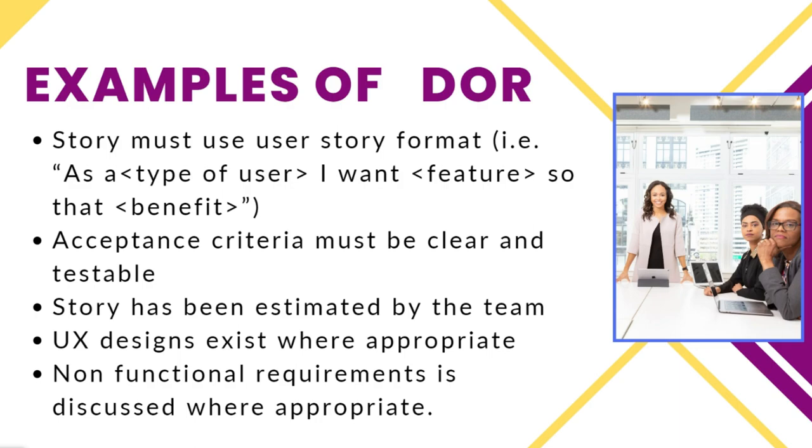All right. Another thing could be non-functional requirement is discussed where appropriate. So part of your DOR could be, in order for the story to be ready, we have to make sure we've discussed the non-functional, such as your performance. You may not have a requirement or AC that says performance has to be XYZ speed, right? But it might just be a discussion that you say, we want to make sure that as we're doing this feature, we don't negatively impact performance. And we talk about those things. We talk about security. We talk about making sure we stay within the regulations. Things like those could be non-functional requirements that you want to make sure you've discussed before you start working on any story. You could put that as a part of your definition of ready.